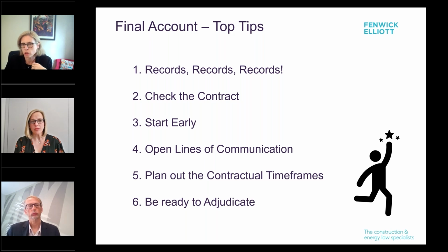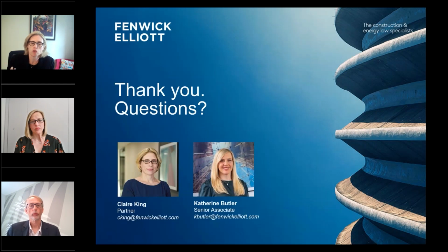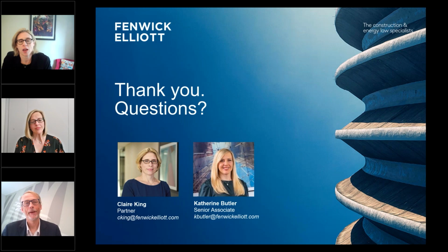So you may need to open up your coin system, for example, and have that sort of payment information available, which can cause problems with data protection, all sorts of things. So just anticipate that and maybe invite an early audit. You know, there's a rolling process for defined costs. When it's ready, you can invite people in to audit it, and then they've got 13 weeks for that process. So get that done during your contract, because then you won't have to do it at the end, essentially. And memories always fade slightly towards the end. So it's best to do it early rather than later.